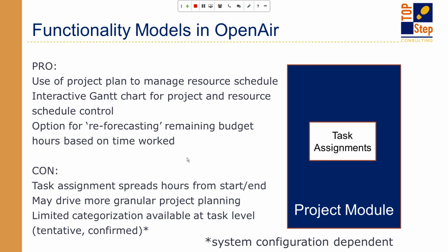It doesn't always tell you how much of their time in any given week they're going to spend working on that. You might have resources who are assigned to multiple tasks over the same time period, with the understanding that a couple of days are going to be spent here, a couple of days are going to be spent there, but you don't really know what they're working on at any given moment just by looking at the task assignment.